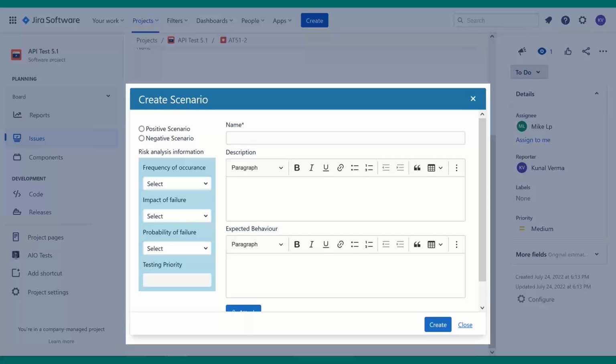But if the expected behavior is not obvious, for example, a person trying to place an order for multiple items, but some of those items are available in inventory and some of them are not. If that was a user story, the user story most likely did not say anything about how the system would handle a scenario like that. You can make assumptions, but your assumptions always remain invalid until you validate them. So I suggest you go back to the product owner and ask, what is the system supposed to do here?